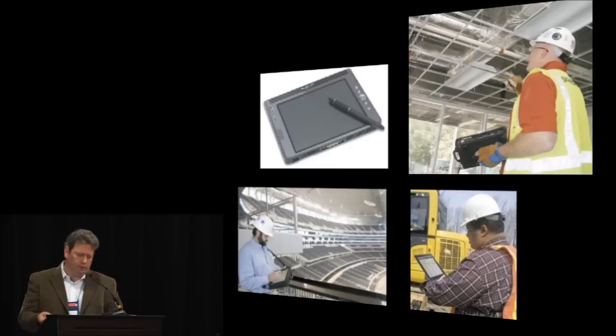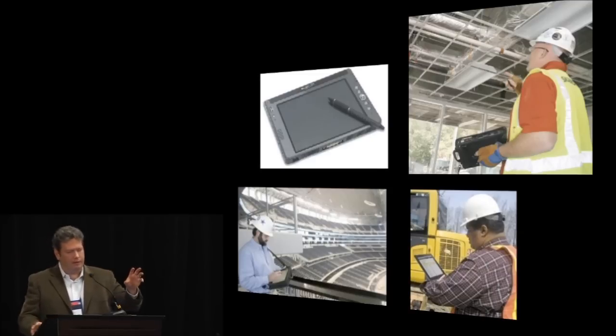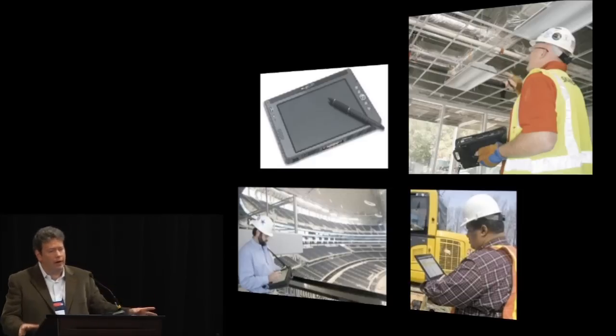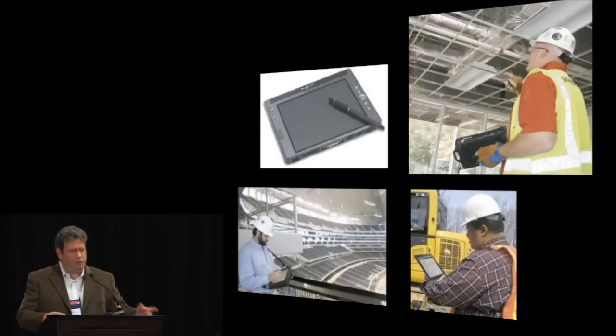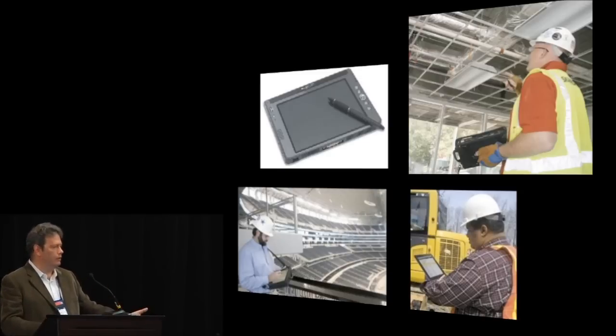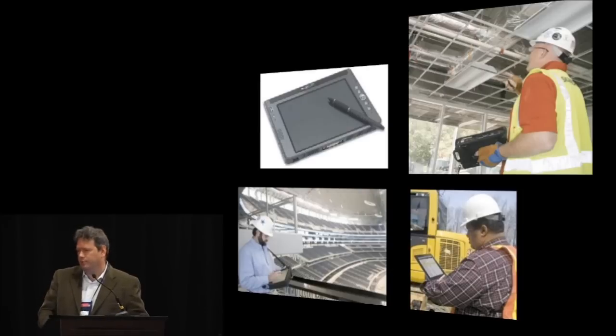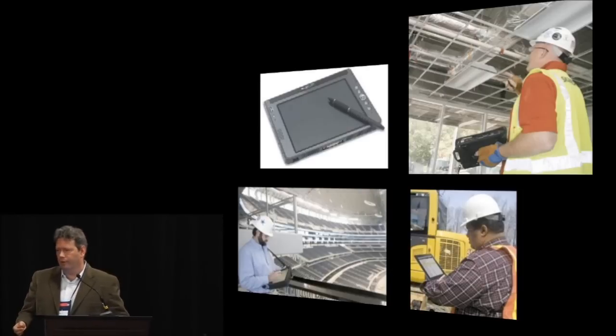Then we had 2 jobs in 2010, very different projects, one in Toronto, one in Pittsburgh, where the contractor used the Trimble to lay out the anchor rods. And they were all correct. It actually kind of screwed up our erector because he wasn't fully mobilized. He thought he was going to spend the typical 2 or 3 days to adjust all of the product in the field that he'd always done. He's in his late 50s, so you can't knock him for expecting to spend that labor. He didn't have to do it anymore.